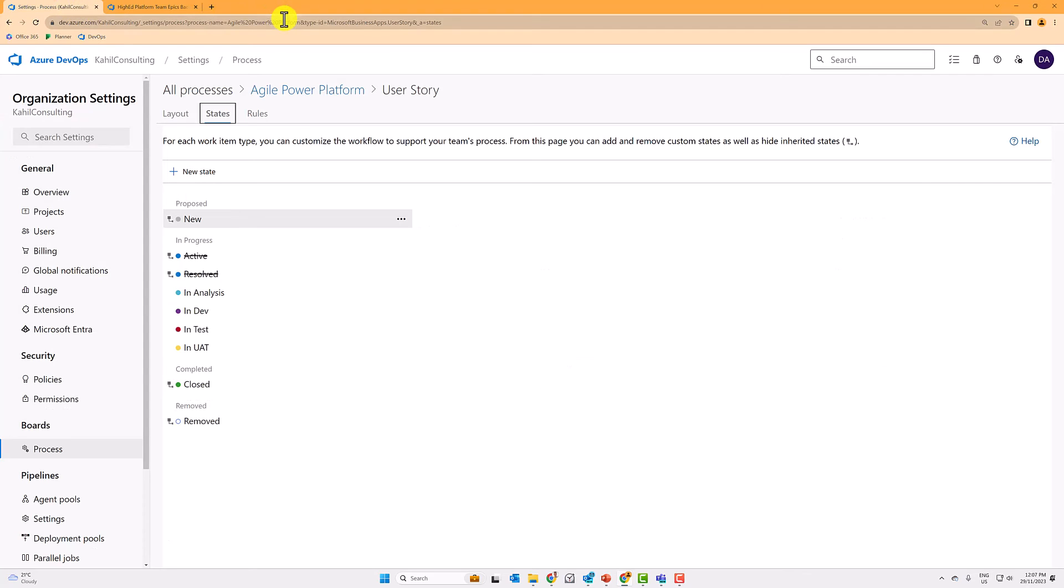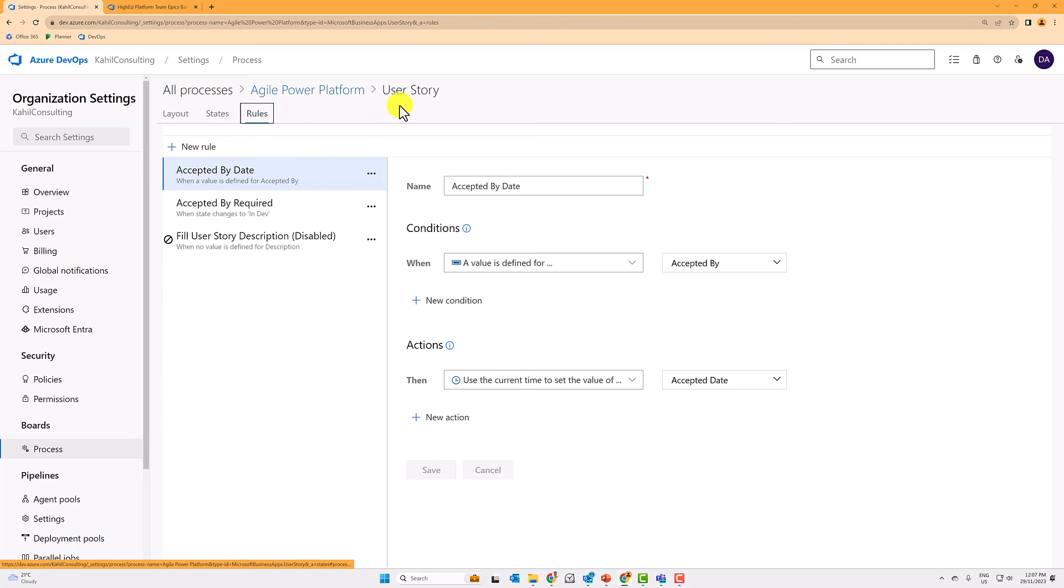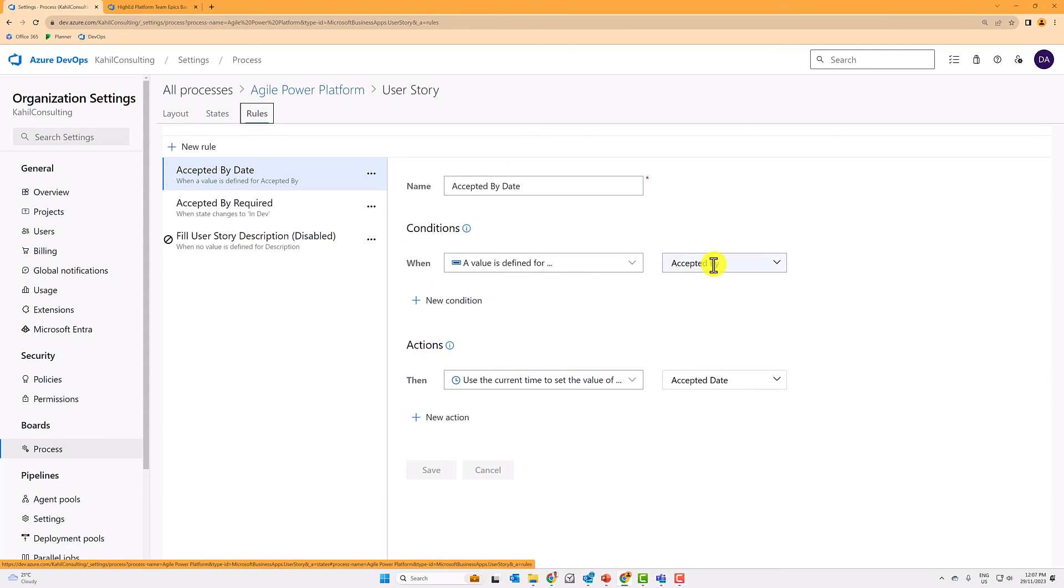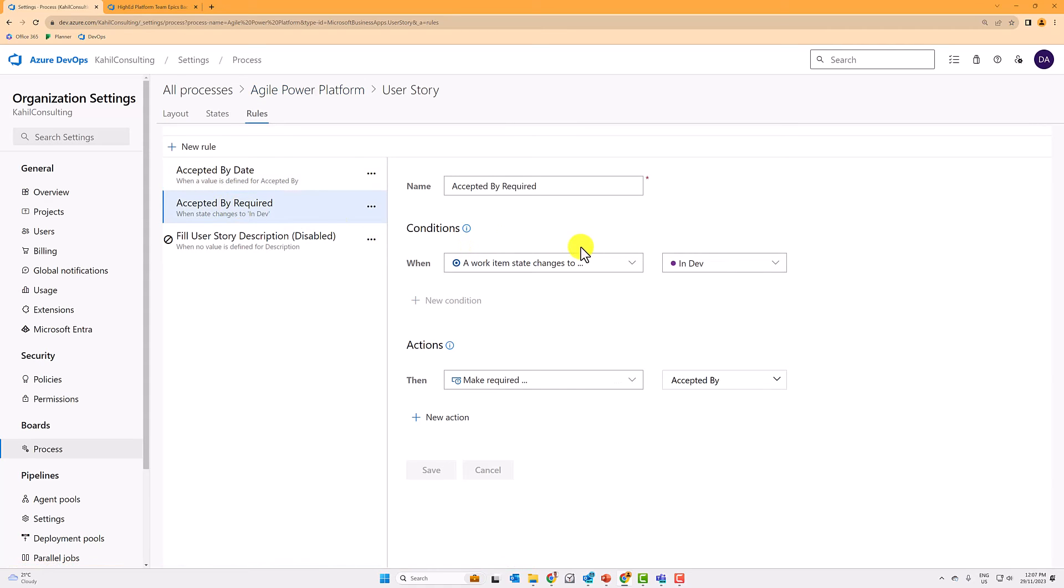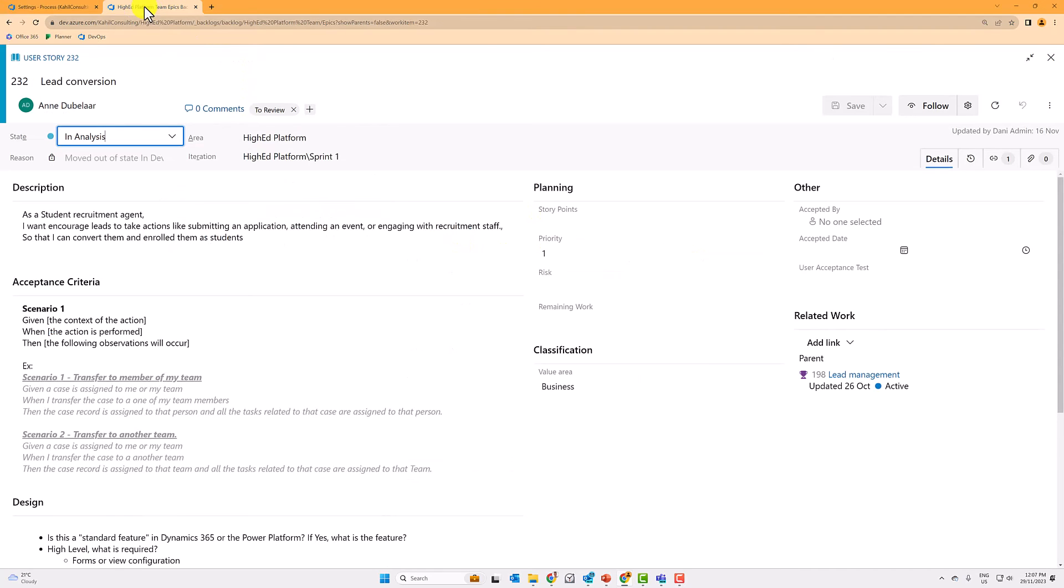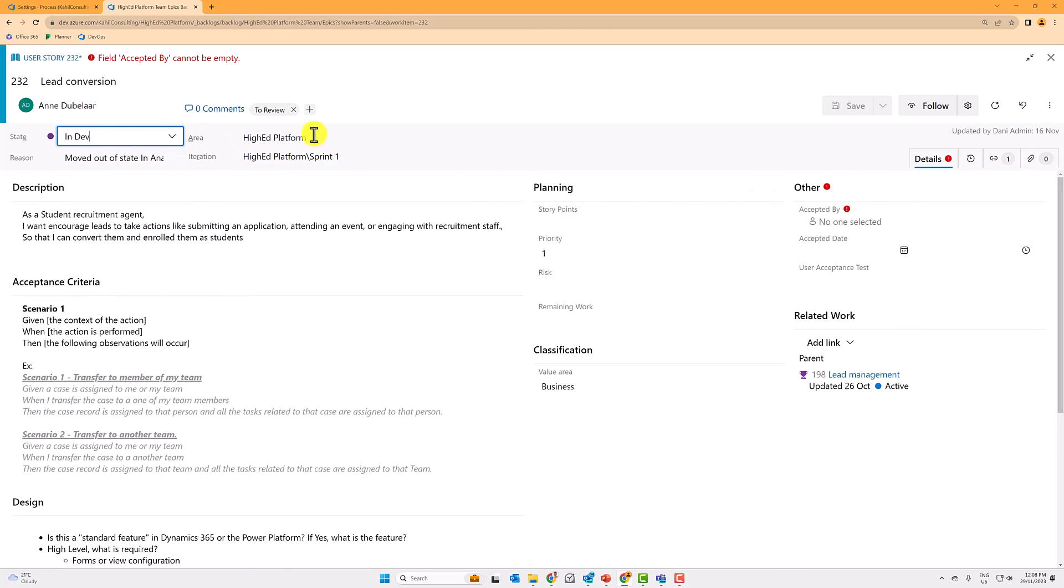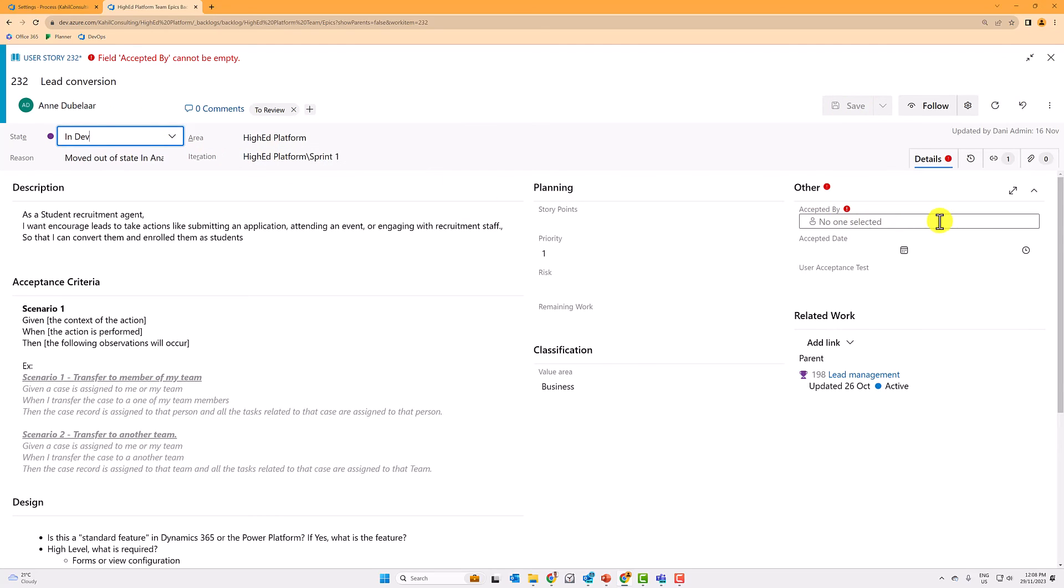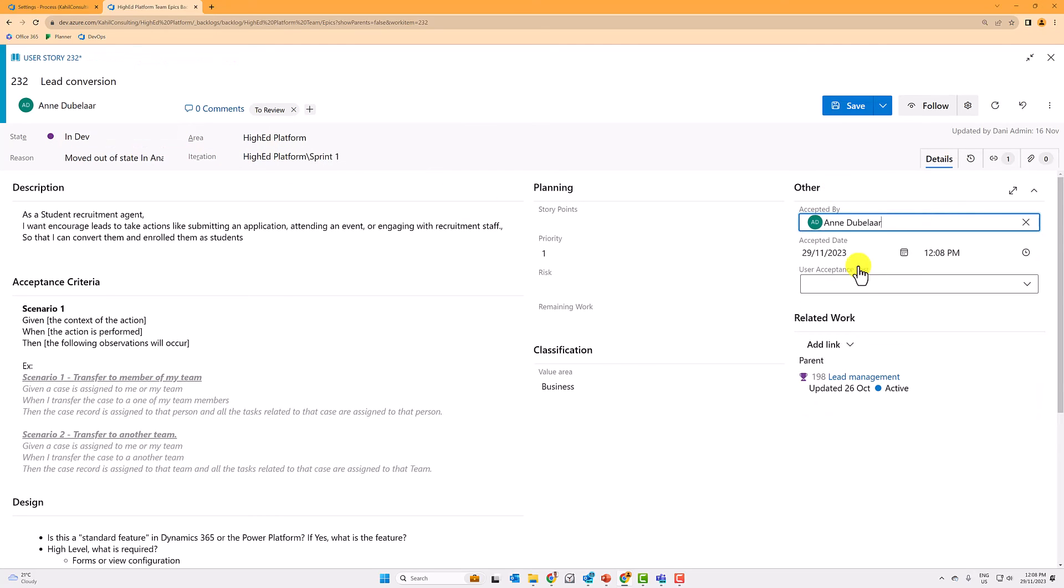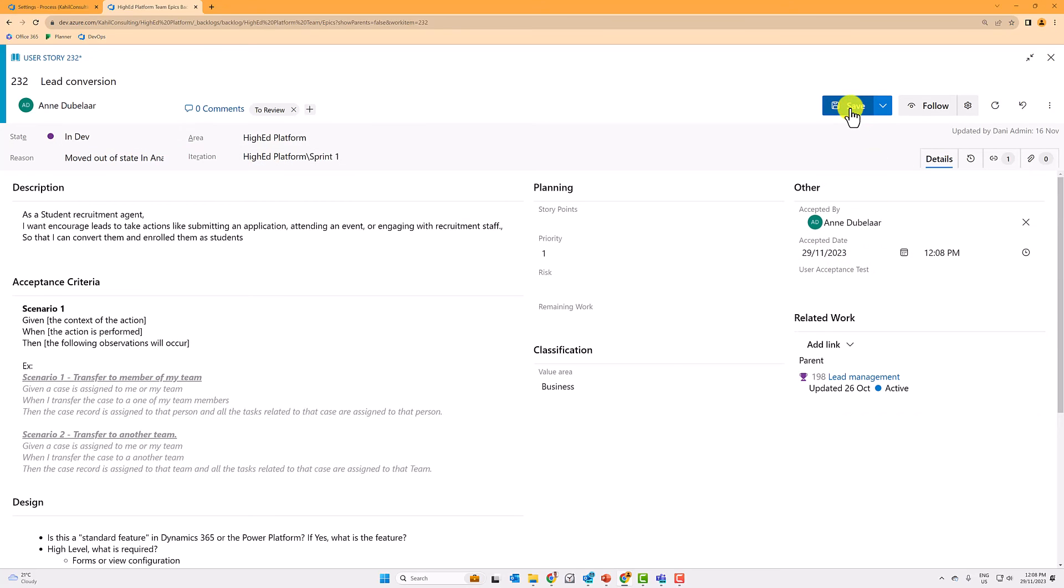And then another trick that I did in the rules, accepted by date is filled in automatically whenever a value is set to accepted by and the accepted by field is required when the work item changes to in dev. So how does that work? You can see that the accepted by is empty, but if I switch to dev, this accepted by now is required and I cannot save that user story without filling the accepted by. So I'll fill the accepted by and the accepted date is automatically filled in as well.